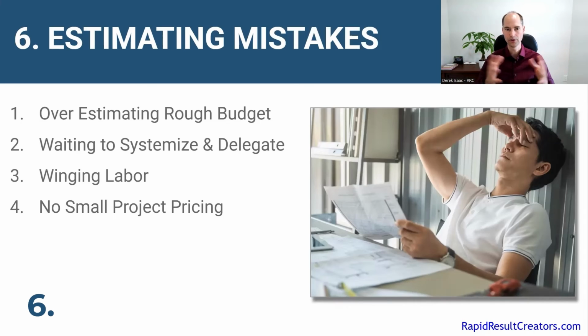So if you are a home builder and your typical home build is $1 million, if you get a project or a build that's less than, let's say, $700,000, maybe that's a small project and you need to increase your markup by potentially 5% or whatever it may be, because small projects still have a certain amount of overhead and just management no matter what size of the project.